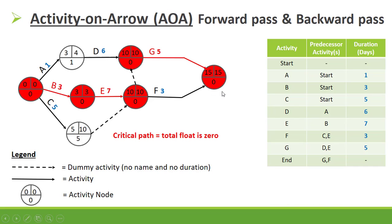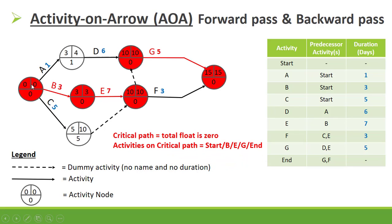Our critical path is where the total float is zero. The activities on the critical path are: start, activity B, E, G, and finish.